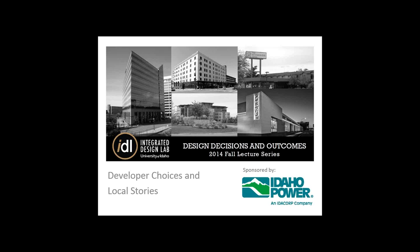Yes, and it's real simple. I'm looking for a 5-year or less payback at this time, and if you looked in the Integrated Design Lab's work, and Leif's work too from site-based energy, we identified those things that had around that 20% return, so 5-year. And we've done some studies with Ticker Engineering where it's a 2.5% return. That's so far out that we can't consider that right now.